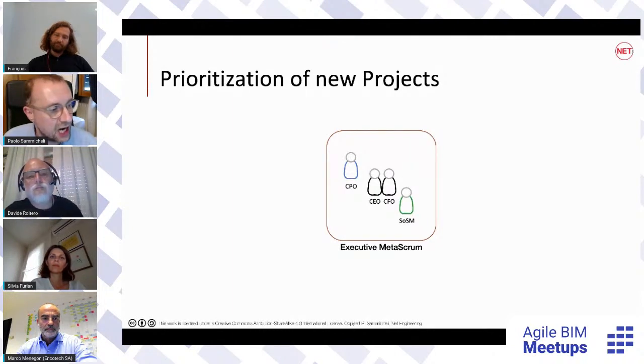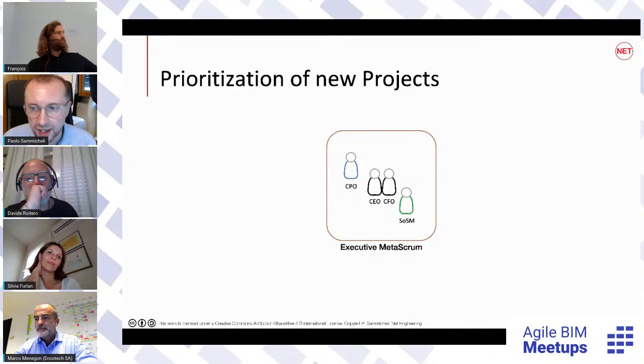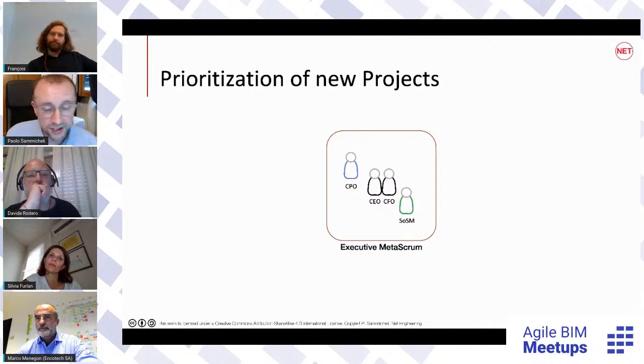We did this exercise the first time just before COVID, when we were in the Mozzerische, one of the quarters of the company, on the 25th of February, when we started with the first implementations. And so when you have a team of teams and multiple teams together, we said that we need them to prepare the product backlog items at high level for the teams before they can actually manage them. And so we have this Meta Scrum team that is composed of all the POs of the company, the CPO, some business owners, people that are still functioning as business people but don't have a team of their own, so to represent some maybe big projects that need to have a fixed connection with the company, or any kind of business expert on some areas.